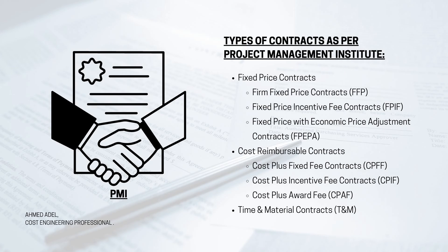The last type is Time and Material (T&M). For example, if you want your apartment painted and the painter quotes 1,500, you might offer to buy the materials yourself and pay only for labor. The painter might then charge 200 for labor only. You buy materials for 300, pay 200 for labor — total 500 — which is better than paying 1,500 all-in. This is the essence of time and material: you pay for the time and provide the materials.